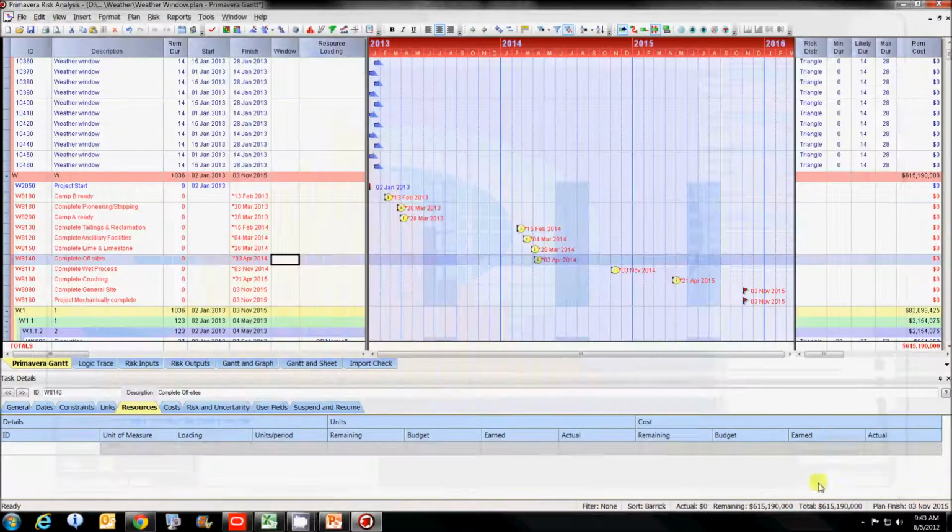I hope you find it helpful. Again, the key here, one thing I found, and I've had some problems here before, is the date format. I found that I had to have a 4-digit year. Otherwise, it seemed like PertMaster became a bit unstable. So I hope this helps.